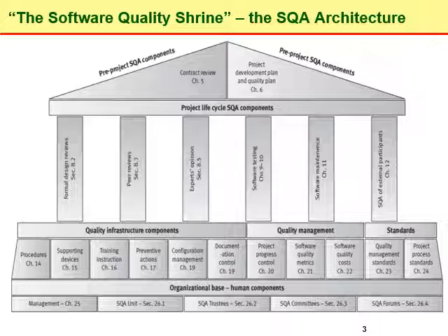So the contract ensures that commitments have been documented, including an agreement upon the functional specification, budget, schedule, and other contractual terms. So the contract review activities must include a detailed examination of the project proposal draft and the contract draft, each of which of course has different objectives.